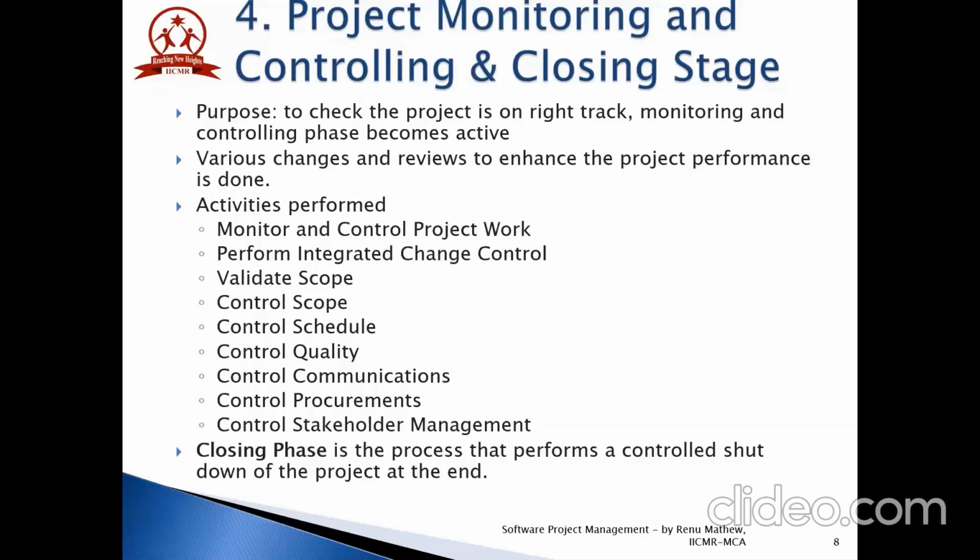Throughout the project cycle, risk analysis is a continuous process. It is important that you continuously analyze, identify, and respond to risk. The activities included in control risk are tracking existing risk, monitoring residual risk, identifying new risk, implementing risk response plans, and continuously evaluating the risk process. The inputs of control risk are risk register and its updated versions, work performance information, performance reports, reserve analysis, risk management plan, and risk audits.